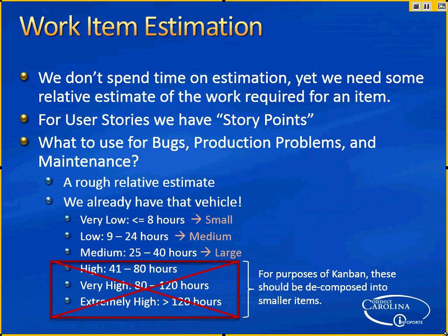So that's for just the bug suppression problems and maintenance, or for everything? Well, I think it would also apply to user stories. Say there's an epic, and remember that's mostly comparative sizing, but in essence it looked like it was 120 hours. It has to be broken down into user stories that are smaller. Do you have a question? Yeah, I was just thinking that you have to deliver things, so you want it broken down into small work packages. Exactly.